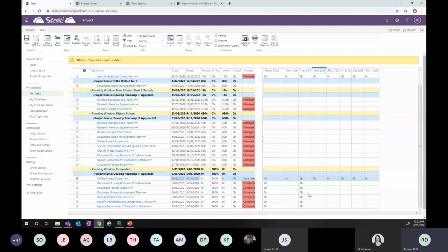So that whole task update loop is completed. Mark requested, Renil is assigned to that resource, to that particular activity, and now that he's actually completed 4 hours of work, he's actualized a part of what the plan was, and I've actually sent Mark an update on that particular task.